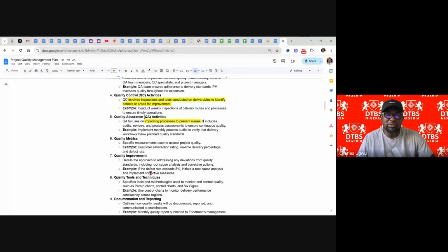Sorry, we're not going to dive into mathematics. So for some of us, if your heart is pounding, don't worry, we're not diving into mathematics. So example, if the defect rate exceeds 5%, initiate a root cause analysis to implement a corrective measure. So if we find out, in this case, all the customers are reviewing our product. Let's say in FoodTrackr, we have an app. When a customer uses that app to order for food,